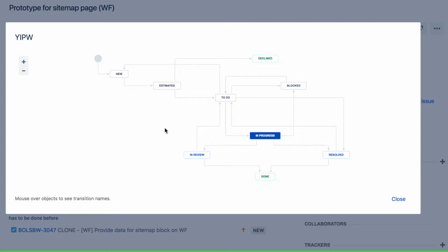And all to do statuses, as project manager, you see all the to do statuses without epics. It means that this task is approved by the customer, and you as project manager should assign epic, sprint, so plan the task,